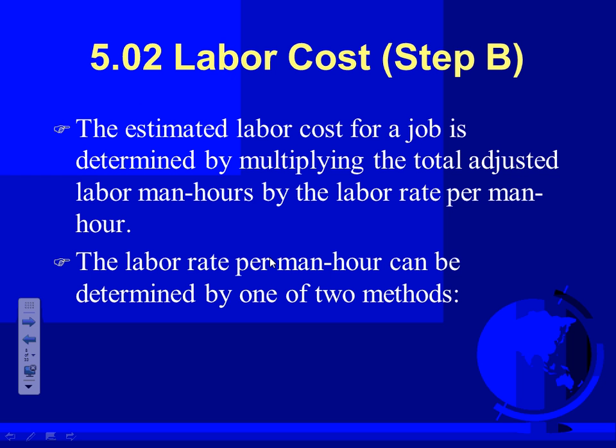Man hour per labor cost. Labor cost per hour can be determined in two ways. There is the shop average. When you determine the dollar value, guys, there is the shop average and the job average when you do them. The shop average, Derek, is you keep track of all your labor for 6 months.